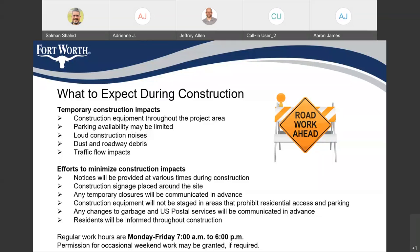We'll be placing construction signage in the project area so if anyone needs to communicate with the city, the signs will have a project name, project number, and contact information. The regular work hours have been set for Monday to Friday, 7 a.m. to 6 p.m. Work will only happen during this time and we will not be working during any weekends or public holidays, except if special permissions are granted if it is required.